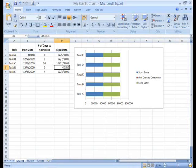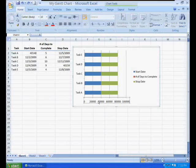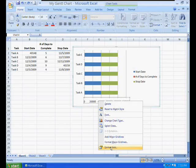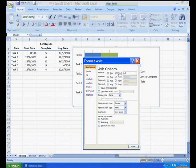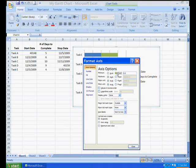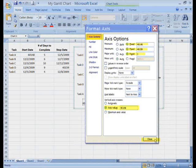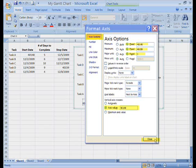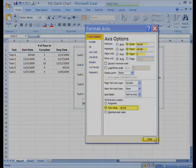We're ready to adjust the x-axis. Click on the numbers along the bottom to select the x-axis. An outline shows it selected. Right click on it to open the menu and then click format axis. Under axis options, next to minimum, click inside the tiny circle next to fixed. In the box next to it, enter the earliest start date in its general format, which is 40148. Next to maximum, click inside the circle next to fixed, and in the box next to it, enter the number for the latest stop date, 40159. Next to major unit, enter 1 or 2 since our table is so short. Under vertical axis crosses, click in the circle next to axis value and type in the minimum value, 40148. Click the close button.